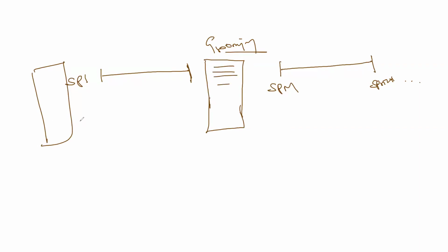Maybe at the beginning we had 100 features. We took 10 out of the product backlog into the sprint backlog, and at the end, we finished 5. 2 we couldn't do, 3 we got feedback on. So those 5 will go back to the product backlog. So now we have 95 features.